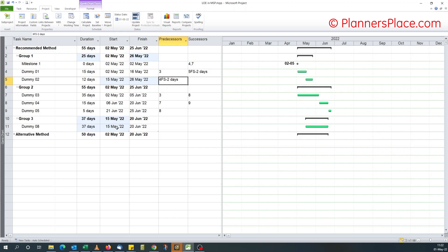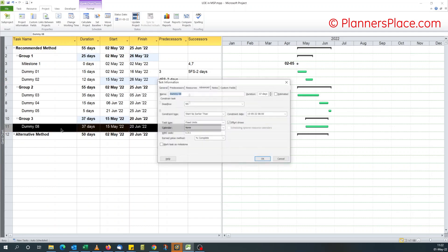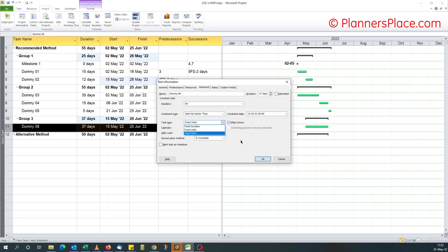I read somewhere that for this to work well, you have to make sure that the task type is fixed units. If you use fixed duration or fixed work, it behaves abnormally. So just watch it — make sure your level of effort activity has the task type set to fixed units.